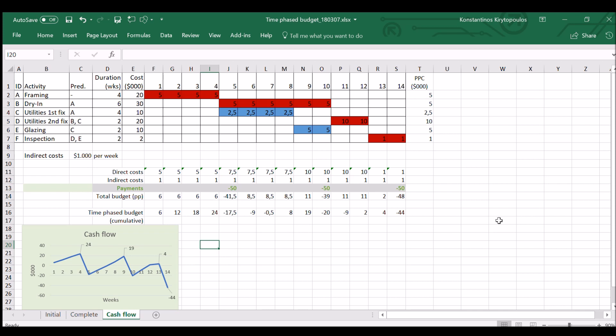The other thing, so we had only expenses before. The other thing is when in reality these expenses are going to happen. So I might be committed when I'm doing, when I have fulfilled one week, when I have completed one week of work. I might have been committed to my subcontractors that I'm going to spend $5,000 for the work done. But this doesn't mean that I'm going to pay these $5,000 at the very end of week one. I may have an agreement with them and say that I'm going to pay you in two weeks time.